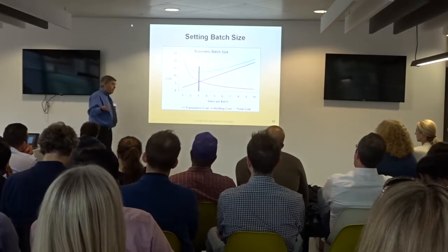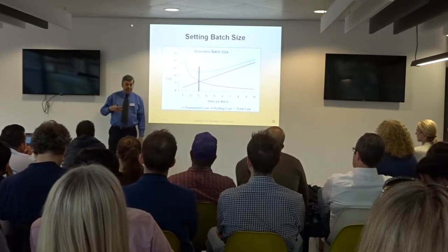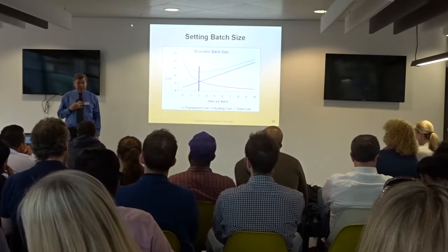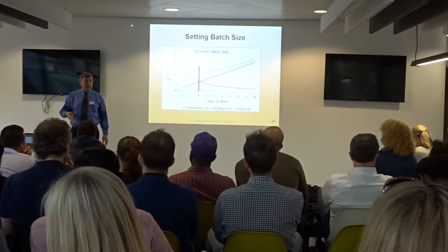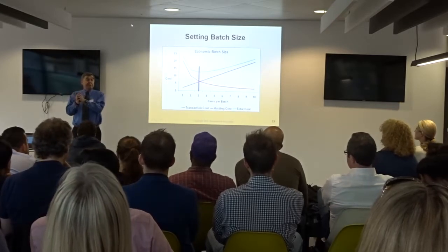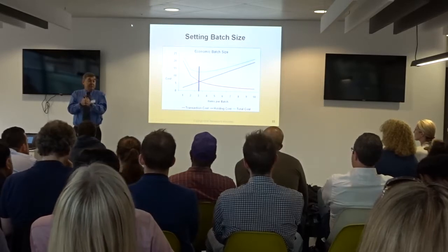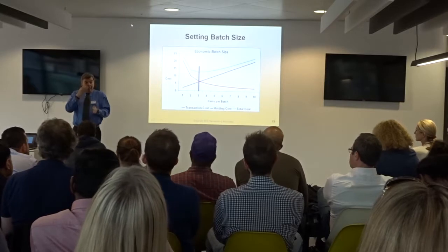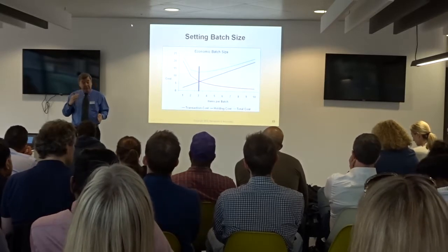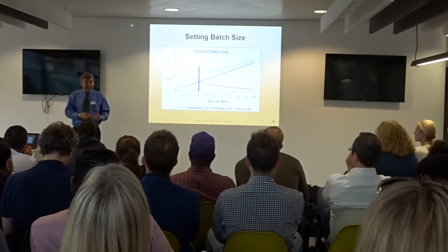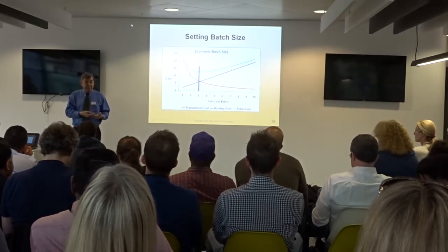And that is actually rippling back into the way some people are using agile methods, because it used to be when you talked to somebody using Scrum, they would introduce all their stories at the end of the sprint because they had a high transaction cost, and they would release all the stories at the end of the sprint. Now, I consistently run into teams who have said, my deployment process has been so automated that I can deploy in very small batches.